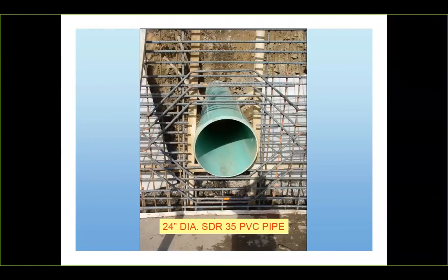Make sure that if you have your pipes coming through walls, as documented in the design and in the specification, it's actually executed on site. Before they place forms and you can't see this stuff, you need to make sure that you have some way of documenting or verifying that the rebar called out was actually placed and was placed in the correct location and the correct size.